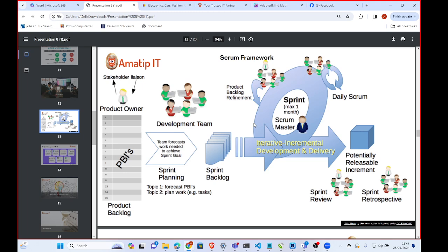definitely it is easier to identify any delay, because if it is 2 days that is assigned to a particular backlog, and after those 2 days you discover that you have not completed that particular backlog, definitely there is a problem, because the time that you still need to continue working on it will affect another backlog that you're supposed to start.